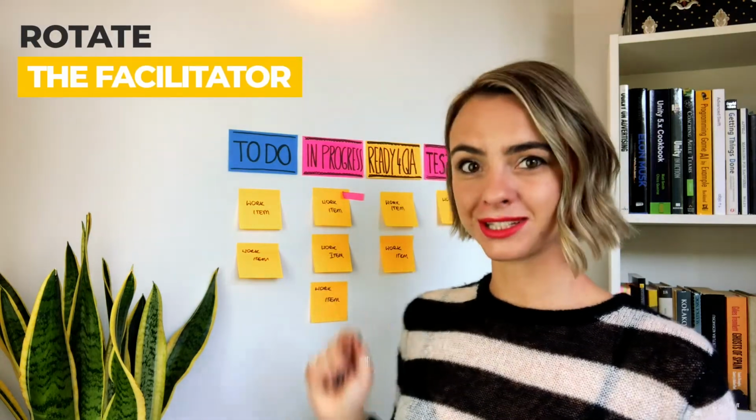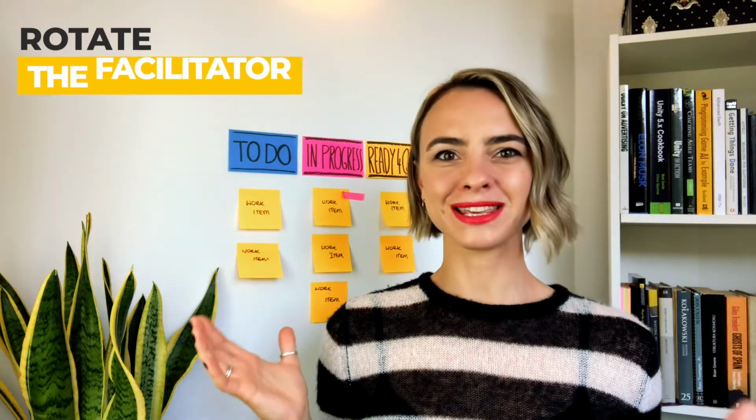Rotate the role of the facilitator of the Walk the Board Daily Scrum. It has so many advantages. Everyone gets to understand what's going on for the whole team, and the development team becomes the real owner of the daily. What we do in some teams is to rotate the facilitation on a weekly basis. Of course, it can be done daily or per sprint, whatever works for your team.